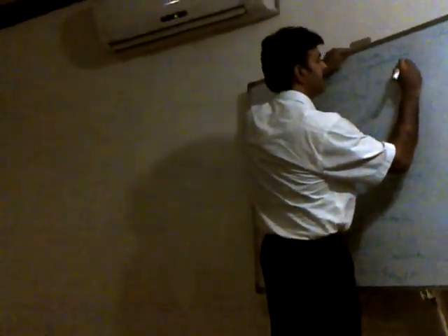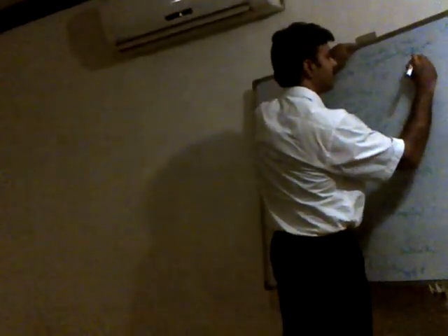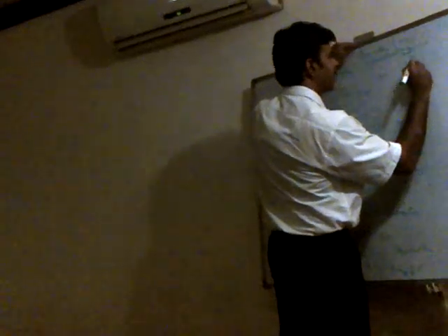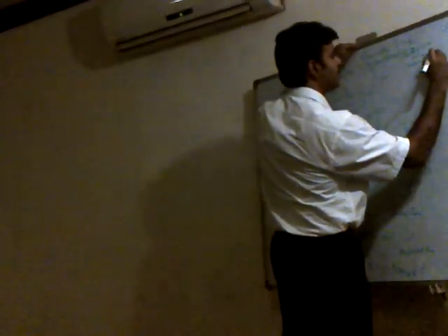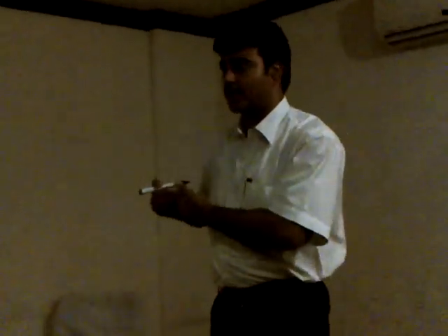What were they? One was monitor and control project work, and the other, perform integrated change control. Now in order to monitor and control project work, what do you require? You require the project plan, and you require your actuals. You would be comparing your project plan with your actuals. There would be a deviation, and whenever there is a deviation, you need to put it back on track, for which there would be a change request, and whenever there is a change request, project documents will be updated.